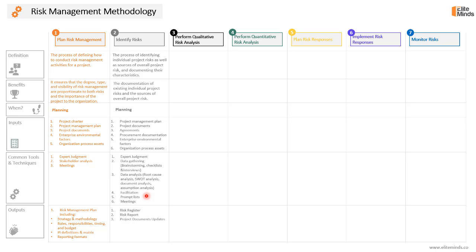The key outputs of this process will be the risk register, which includes all the identified risks with their key characteristics, and the risk report, which gives a brief about the overall project risk exposure. Some project documents may be updated as an outcome of this process, like the assumption log. Once risk identification is over, we can start performing the qualitative risk analysis process, or the subjective risk analysis process. In this process, we will prioritize the identified risks from the previous step.